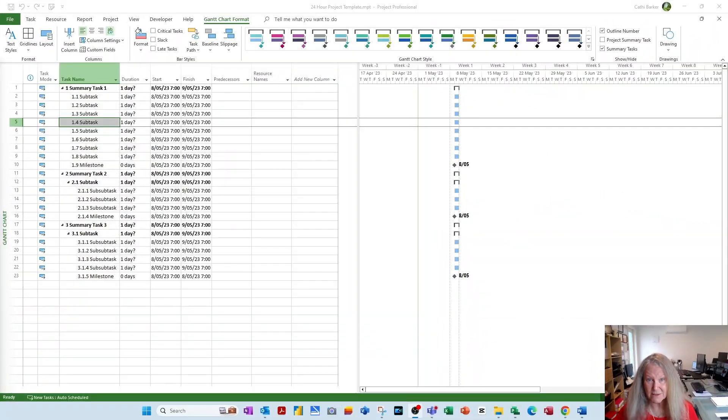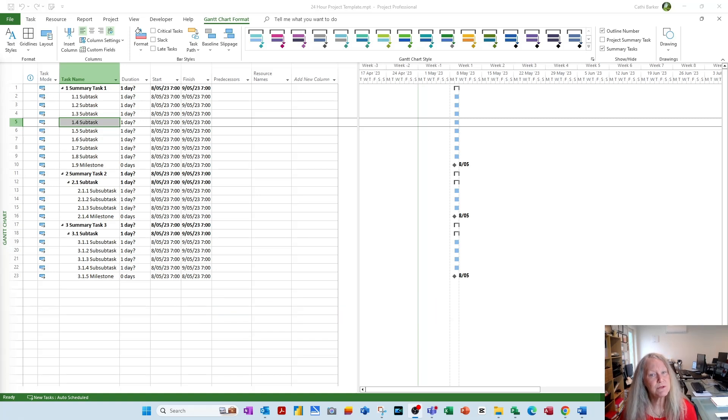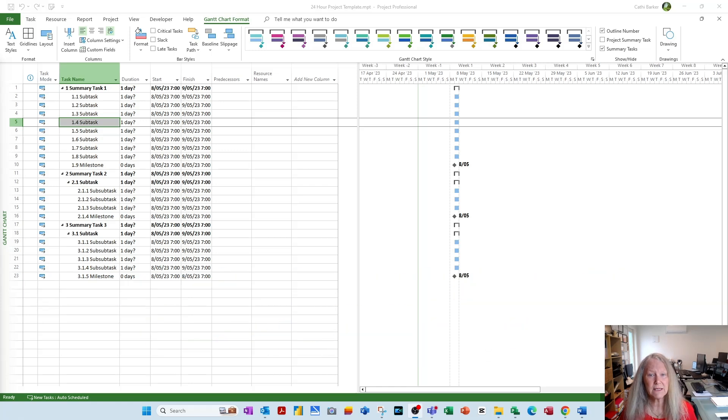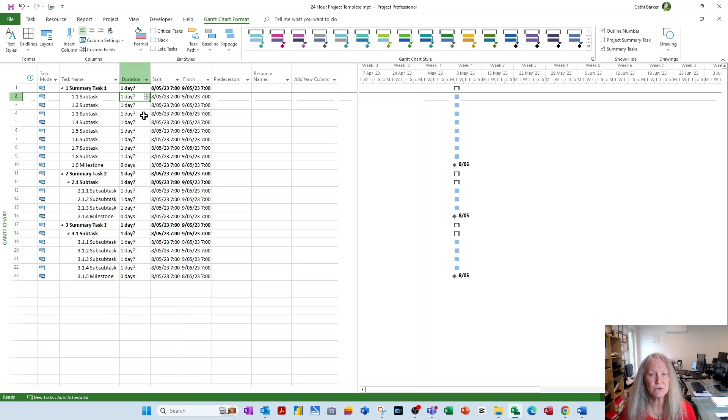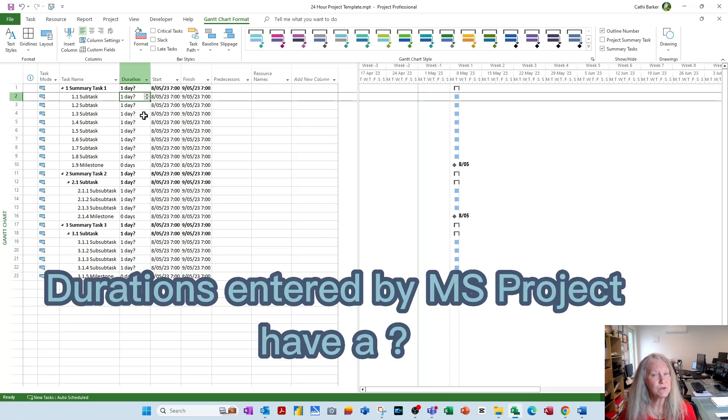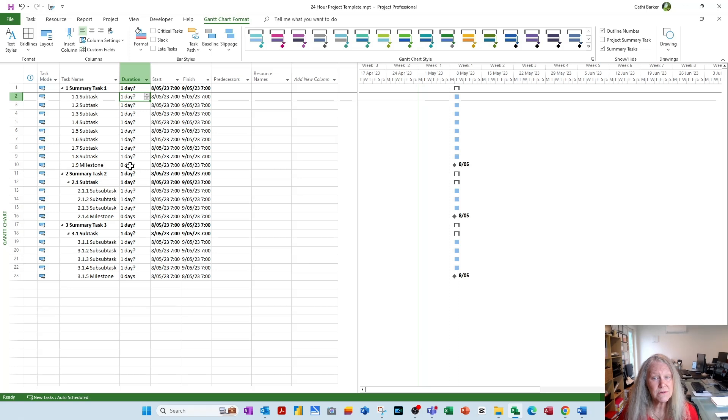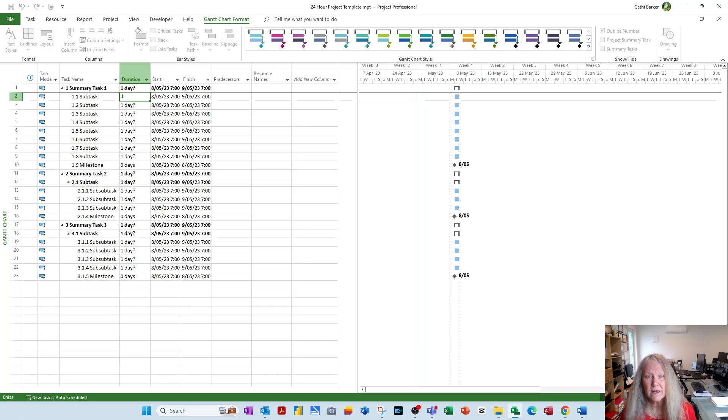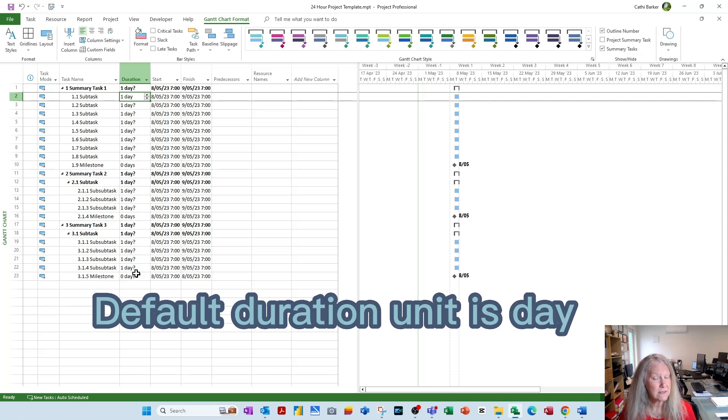Step 6, durations. This is the amount of time you're going to put aside or allow for something to be completed. Now we are working in a very generic sort of template. So we're just going to put some durations in just to show you what you can do here. Of course these will be adjusted when the real tasks are put in. The durations that have a question mark are durations that project entered because we're not able to put a question mark in. And so the question marks tell me that I haven't actually gone through and put any durations in except for the milestones. Now if I enter just a one, say for this row here, the question mark disappears and it does default to days.